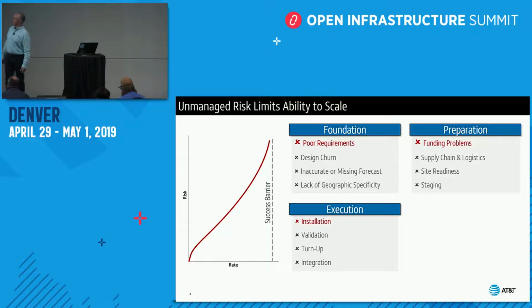Installation, we talked about that a little bit from the prep stage, kind of the bridge from delivery to install, staging. Installation sometimes is problematic. You can have hardware failures, cable problems, drives came in with the wrong size, they shipped the wrong components. So these are all kinds of things that can come up during the installation phase.